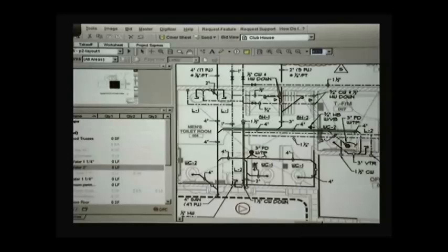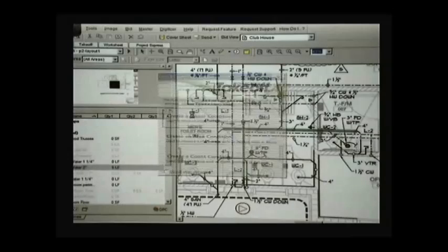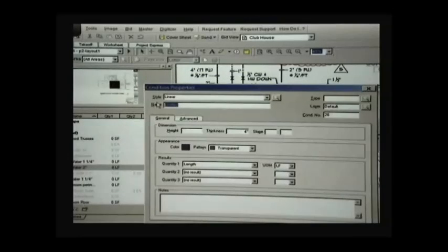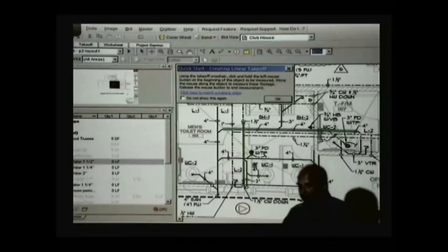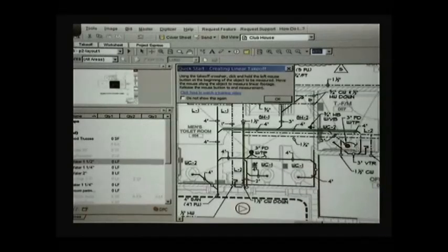So you have cold water 2-inch, and cold water 1.5. So you want us to create a different condition for each size of line? Exactly, because when you go to buy it, you will have different diameters, right? So you need to identify that as a different diameter.